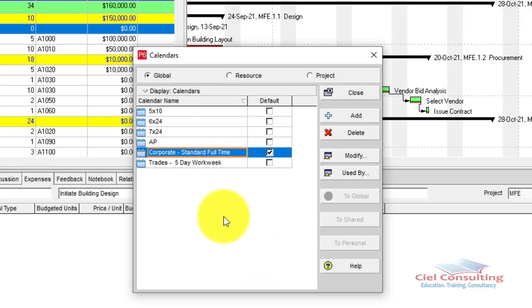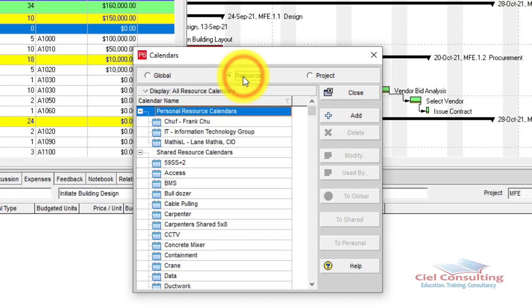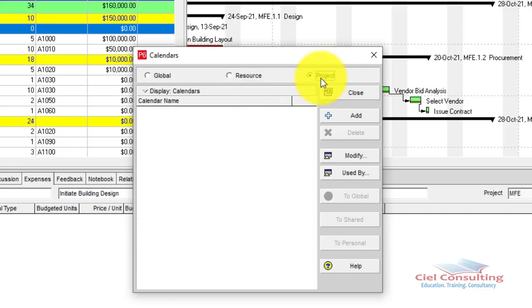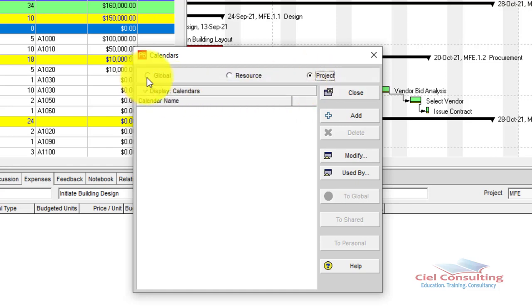The Global Calendar can be assigned to every single project you have in Primavera P6. The Resource Calendar is for your resources — for example, a resource person who works three, two, or seven days a week. The Project Calendar is specific to the currently open project, and only that project can use it. Note that a project calendar can be converted to a global calendar and vice versa.